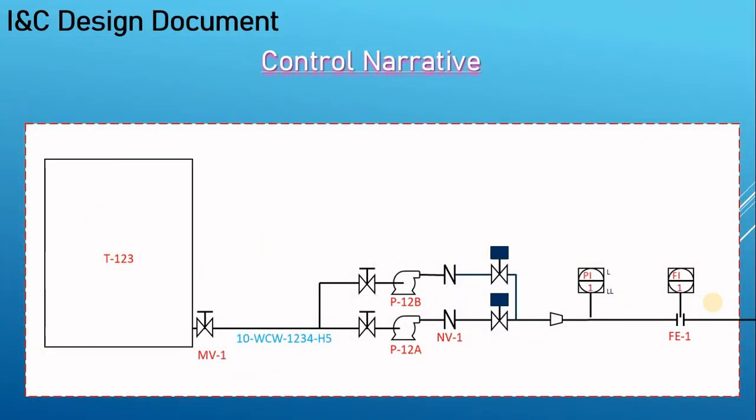Now we'll move to another deliverable, the control narrative. In the cause and effect case, sometimes you will assume the time consumed in this cause and effect. Some of them are very easy and direct, let's say you have 2-3 causes, and you will say it's 1 day 8 hours, or 2 days 16 hours per cause and effect.